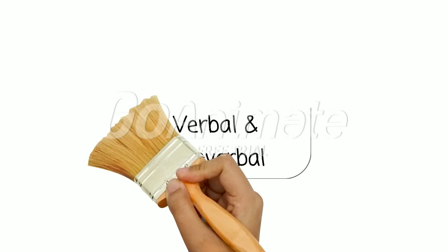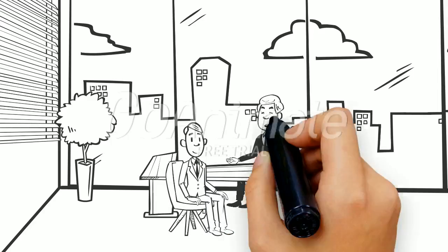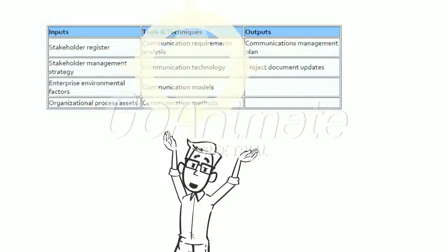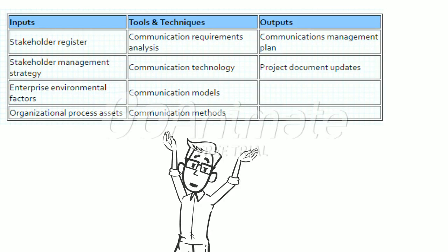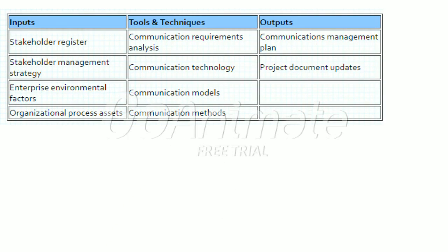Now we will discuss the stakeholders in all project communication management processes. I also included a diagram for you to understand alongside my explanation. The plan communications process involves determining what kind of information should be shared with which project stakeholder. This is documented in the communication management plan. Also documented is how and when the communication needs to be shared with stakeholders.